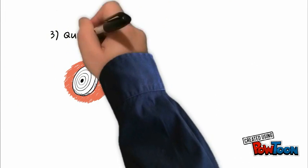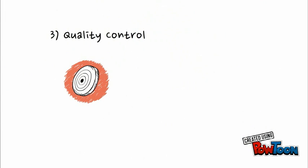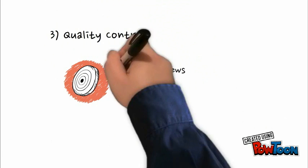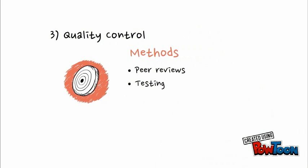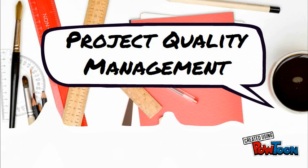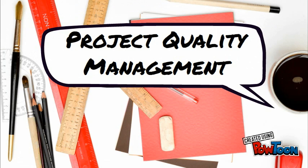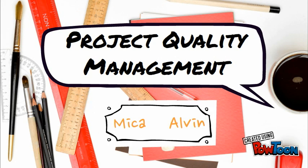Performing quality control is verifying that the product meets the quality requirements. Peer reviews and testing are two methods used to perform quality control, and the results will determine if corrective action is needed. And that's it for quality management — stay with us for the next module. By Micah and Alvin.